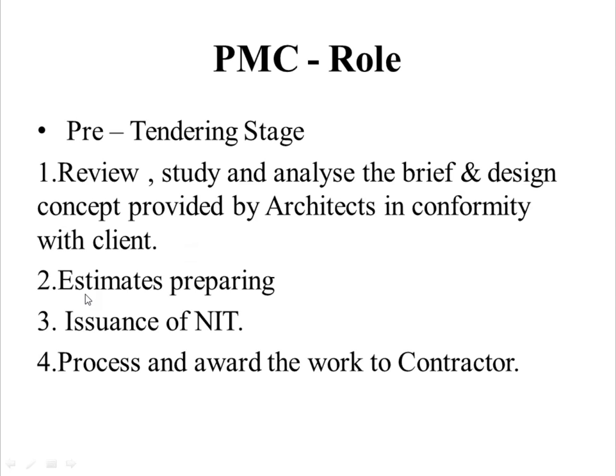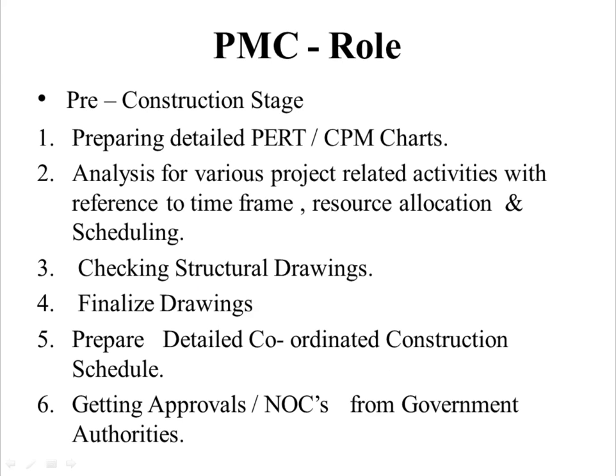Then they need to prepare the estimates. Then they need to do the issuance of NIT, that is notice inviting tender. Then they need to process and award the work to the contractor. So these are the roles in the pre-tendering stage. Now the pre-construction stage, the role of PMC during the pre-construction stage.